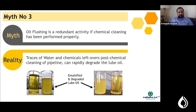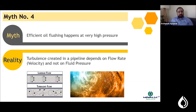Myth number three: oil flushing is redundant if chemical cleaning has been performed properly. At multiple sites, chemical cleaning was carried out by the contractor but lube oil flushing was ignored. As a result, traces of water and chemicals used during chemical cleaning were left in the pipelines. As soon as the lubrication system was started, the lube oil was immediately contaminated, permanently degrading it.